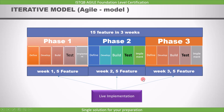Each phase has a define, develop, build, test, and implementation stage. So we can see that live implementation of the software will happen in all of the phases. We are repeating the steps in each one, and this is why it is called an iterative development model.